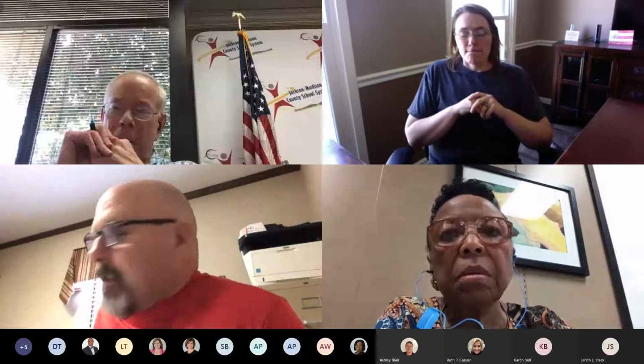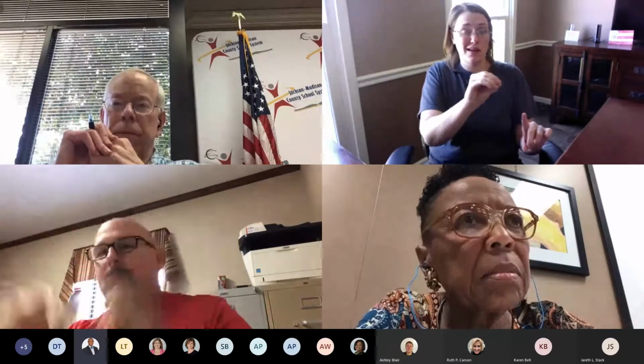Okay, sorry, Jim. My question pertains to what you asked in the board meeting when we first started talking about this. So the board votes on this contract next board meeting, and we approve it. So the payments to the construction manager begin, correct? No. Not until the county commission actually funds it. Right? That's right. Okay. We have this notice to proceed built in.